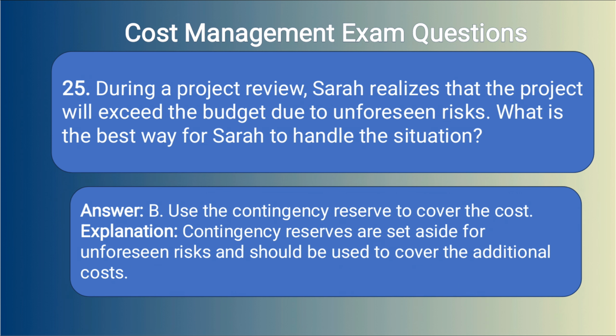Answer: B. Use the contingency reserve to cover the cost. Explanation: Contingency reserves are set aside for unforeseen risks and should be used to cover the additional costs.